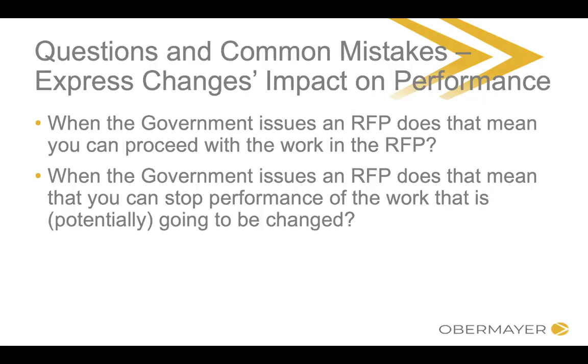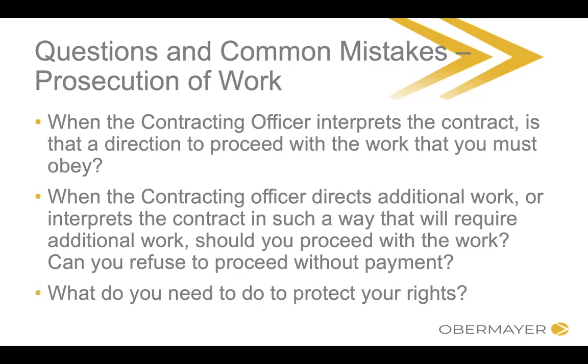Because I'm at the point where I need to go down one route or the other. If you don't give me a change, I'm going to go down the route that was originally in my contract. And if you change it later, it's going to cost more money. It's going to take more time. So again, if you're in that situation, it pays to talk to a legal professional to make sure that you're dealing with everything. But the key takeaway here is an RFP is not a change. Wait till you get the change.